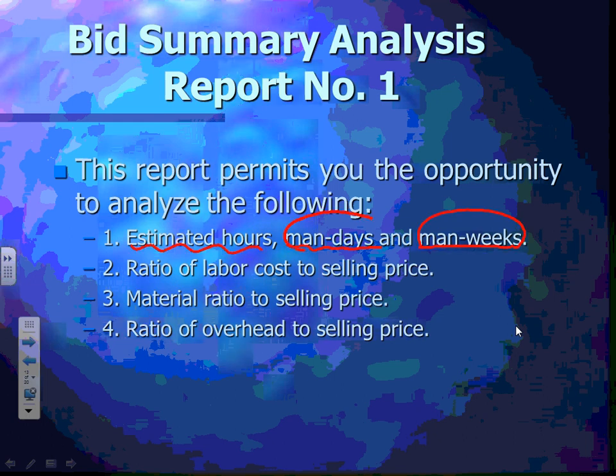Do you guys remember that we did this one in McCormick and we did it in an Excel sheet? How many man hours or person hours do you need for this job? That's so powerful. You need to know at the end how many man hours, because if you have done similar jobs and you're double the man hours that you need, this is a flag in terms of bid accuracy.